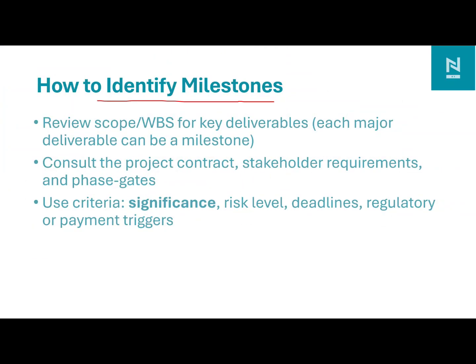How do we identify the milestone? First, we need to review the scope and WBS for the key deliverables. What are the deliverables we need to submit to the client? On the basis of that, we need to identify the milestone. For example, if we are doing the design part for a platform, then the IDEA drawing can be a deliverable for it. It can also be a milestone for the project, submission of the IDEA report to the client. On the basis of project requirements, the milestone can be defined.